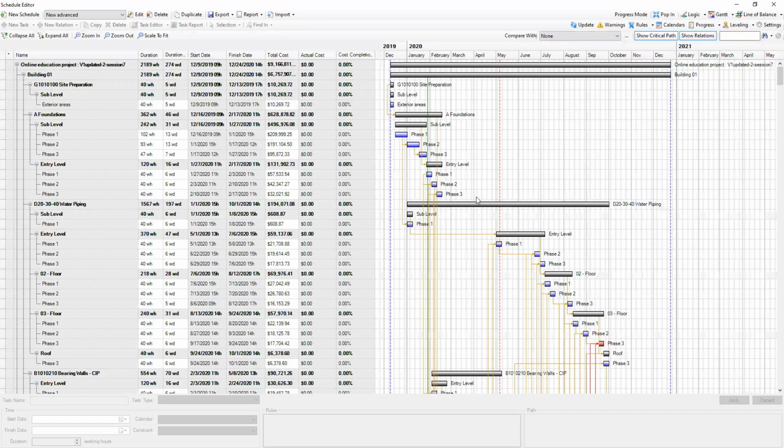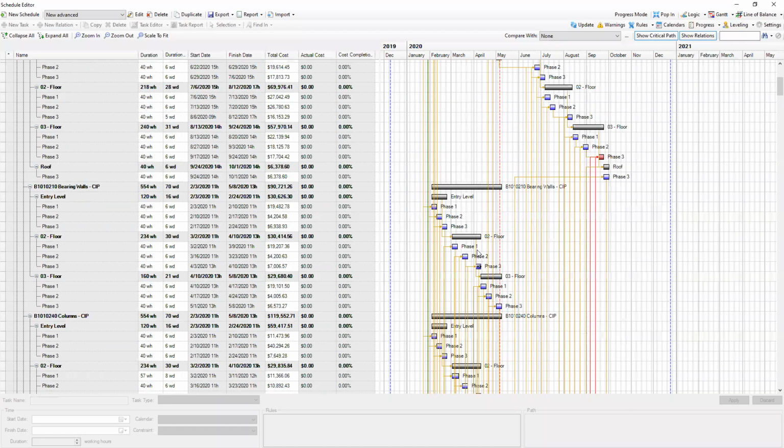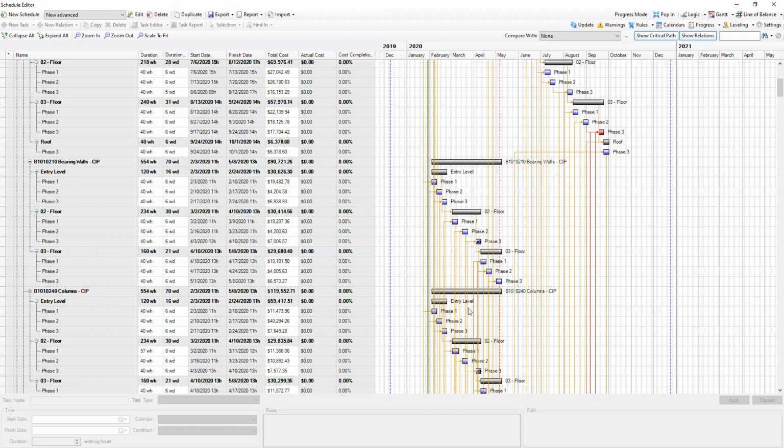But again, if your client actually just wants to get the Gantt chart, or he doesn't understand the additional benefits of the line of balance or using BIM at all, and he is just using the traditional way of creating a Gantt chart with other scheduling tools, the main thing is how to actually control the quality of the Gantt chart. I know that there is some software for, let's say, Primavera or similar, which is actually controlling the quality based on the number of activities and the relation of the activities in the schedule.